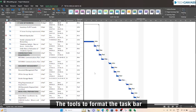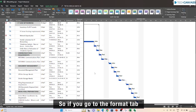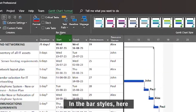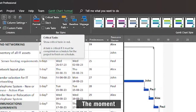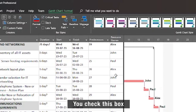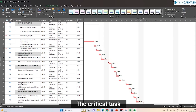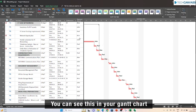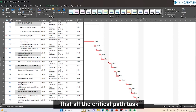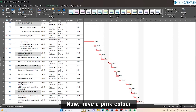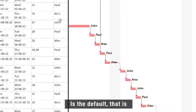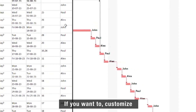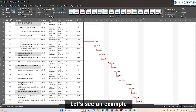The most common usage for this is to highlight the critical path tasks. The tools to format the task bar are in the Format tab. If you go to the Format tab, in the bar style section, we have a checkbox called critical path. The moment you check this box, it is going to show up the critical tasks. When I turn it on, you can see in your Gantt chart that all the critical path tasks now have a pink color, and it is now very easy to see the path they take. The pink color and task bar shape is the default configured by Project. If you want to customize the critical task bar, let us see an example.